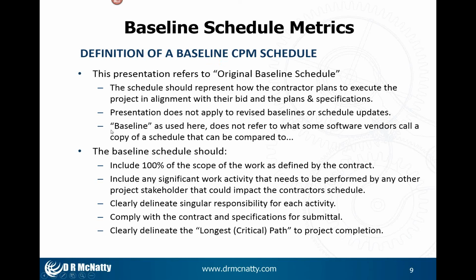Also, the word baseline here is not the same as what P6 calls a copy of a schedule that you can compare to. Back in the P3 days, when you compared one schedule to another, you were taking a current schedule and comparing it to a target. And that's the way it should be today too, but for whatever reason it isn't. So they use the word baseline kind of loosely in some of the scheduling tools out there today. So it should include 100% of the scope.